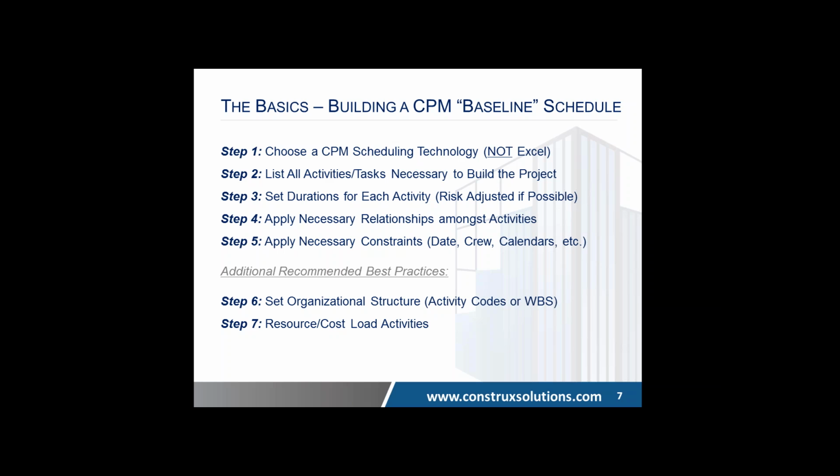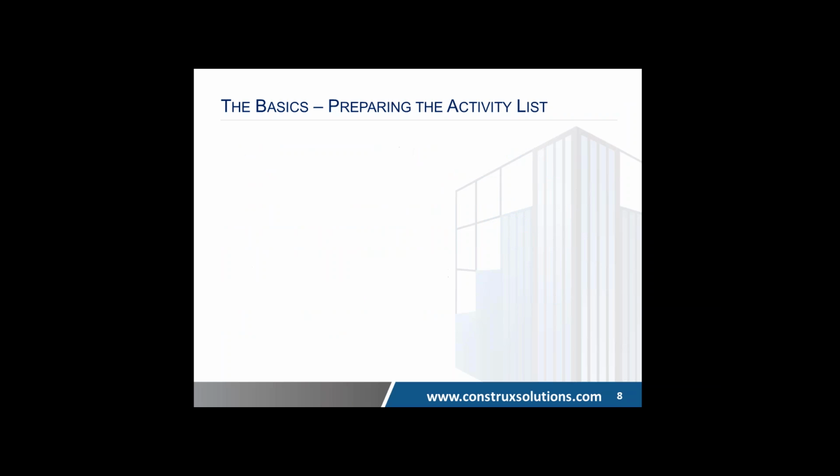It makes it very hard without that basis to prove to the owner or to your CM or to your GC, if you're a trade contractor, why you're over budget or delayed, because you never had a basis. The only basis you have is a duration, and this really could ultimately affect profit margins. So I highly recommend resource and cost loading activities. A lot of the people that I talk to out there in construction, when I bring that up, they look at me like I'm crazy because that's going to take time. It's going to take time once, for a few hours, if you just want to sit down and drill through it, and it's going to save you a lot of money if you do it. So I highly recommend it.